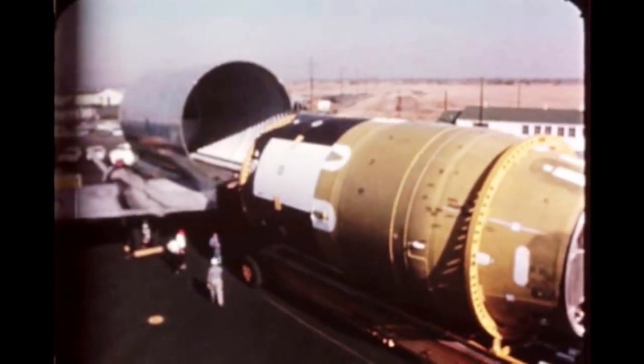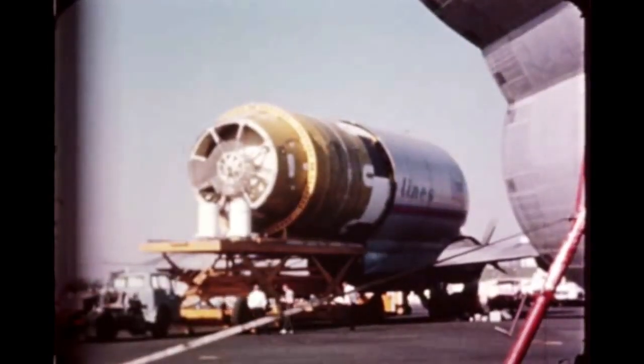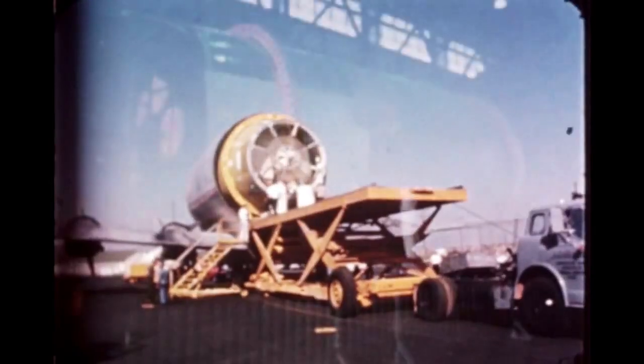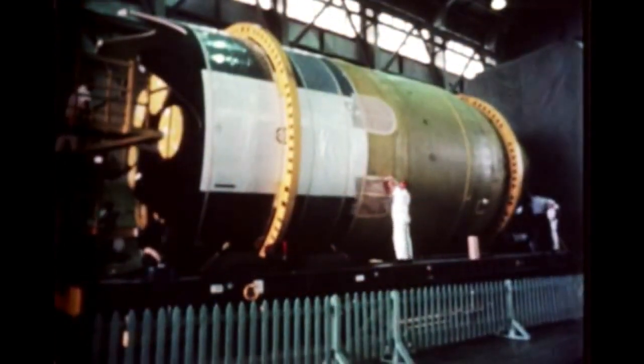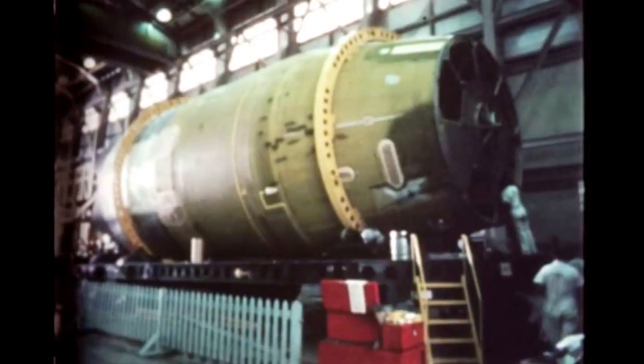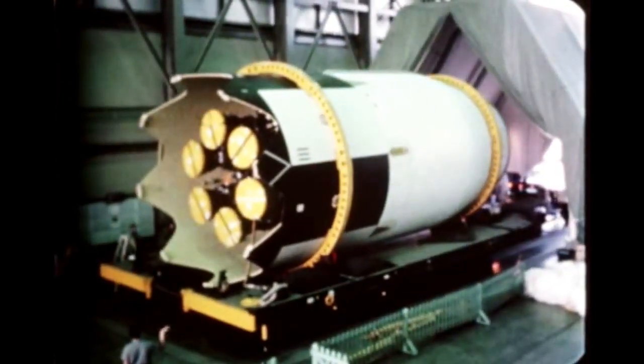At the SACTO test facility, Douglas completed all phases of S-49 testing and final inspection. The stage was stored temporarily until October 21st, when it was flown to Cape Kennedy, arriving October 22nd. The stage was transported to Hangar AF and hangar checkout was begun. Following application of a special heat-resisting paint, the stage was erected on the pad November 19th.